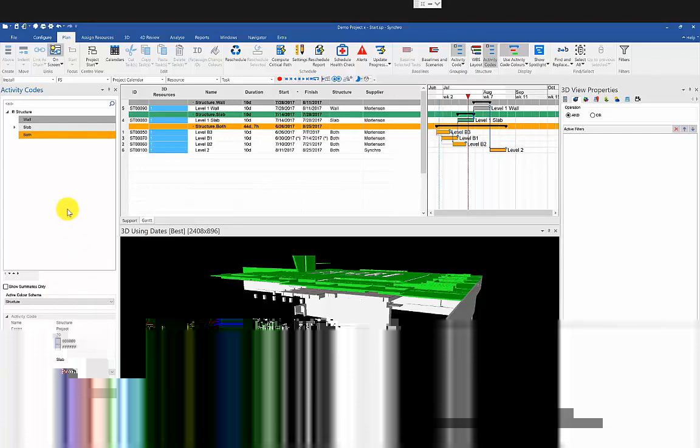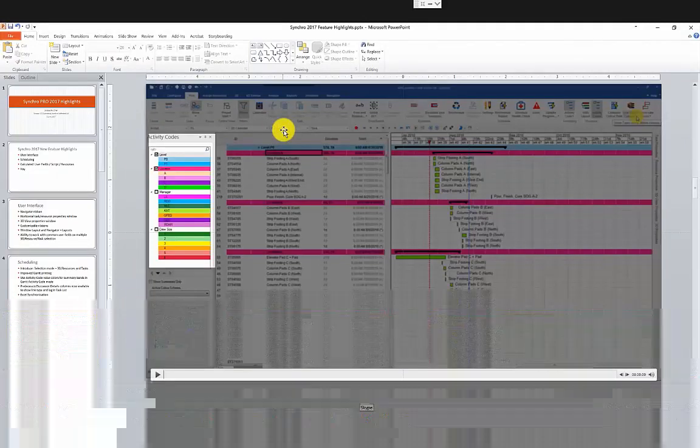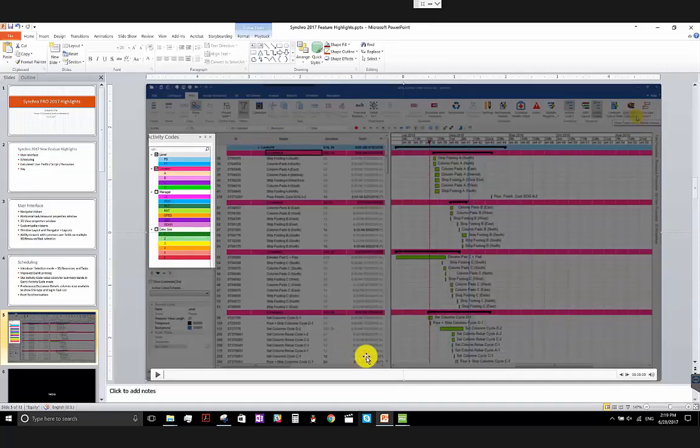So that the bars will be highlighted in the colors as well. So to set the activity code value colors, you can actually select the activity code value, okay? Go to the bottom in here, you will be able to choose the bar color, okay? It's very simple to use, and I'm also planning to provide a workflow video done by Kate, which shows you how this can be more colorful and more customized, okay?